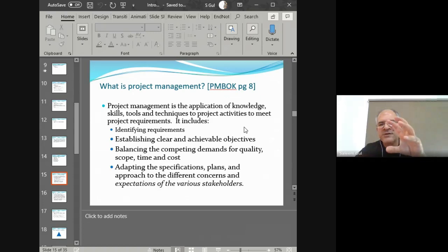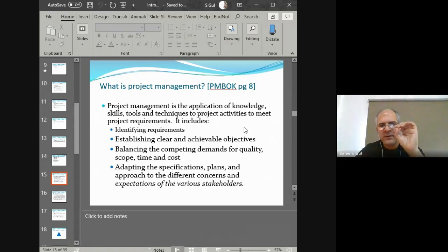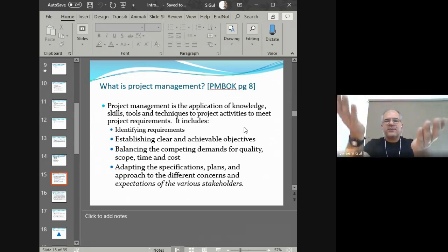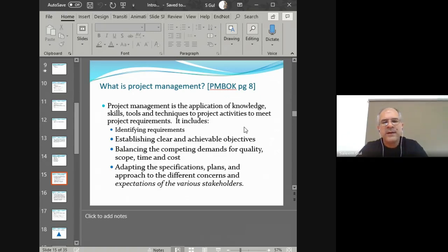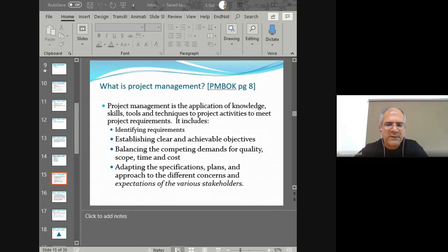We don't want ambiguous, unmeasurable goals in a project environment. We want limited, clearly stated, quantifiable, and achievable goals. And as a project manager, what we're trying to do is balance the iron triangle — the project management triangle — where quality is in the middle and scope, time, and cost surround it. Any changes in scope, time period, or budget are going to have an effect on quality, so we must make sure we don't damage the quality of the product, service, or result we're producing.